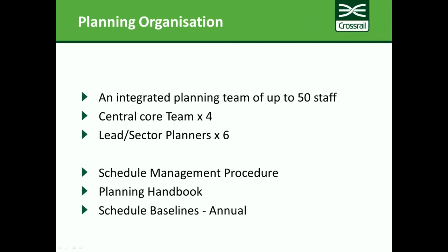So testing and commissioning might be a more recent one, where we've added that when our understanding and maturity has reached the point where we're ready to instruct the planning team exactly what we want them to do and how we want them to approach testing and commissioning, as an example, in a standardized way. So we have a schedule baseline. Having an annual baseline has served Crossrail very well. That's underpinned by a series of program level milestones. They're all well understood and reviewed on a regular basis or a periodic basis around Crossrail. So all that's worked well in terms of our methodology, which I'll come on to talk to some more.